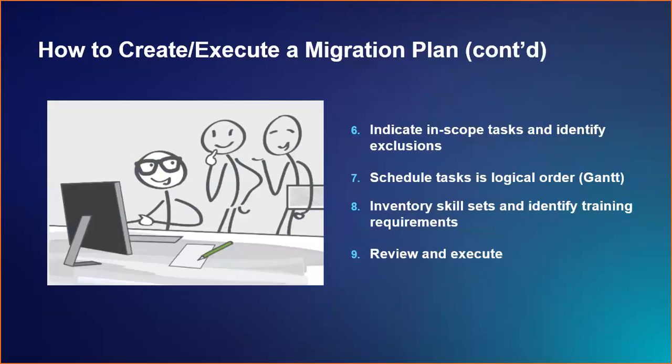Once the project team is identified, a skills inventory should be performed to help identify any missing skill sets that will be required for project execution time. Knowing these gaps allows you to modify resources or gives you time to source the appropriate training for those individuals.